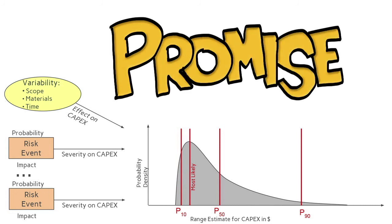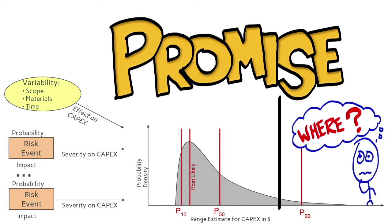The act of proposing a formal budget or schedule for a capital project is quite complex and follows well-established corporate practices. The typical outcome is to select approximately the P50 estimate, but there are many trade-offs to consider in this decision.